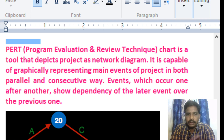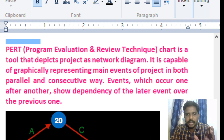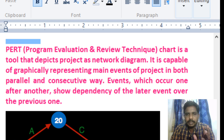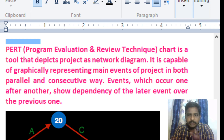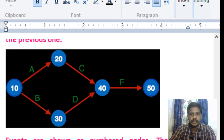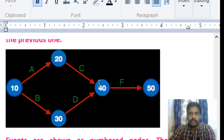In the PERT network diagram, we can represent five tasks. The first task is the base task. The second task is prepared after the first task. The fourth task is prepared after the third task. The third and fourth tasks are both prerequisites for the fifth task, showing the flow of task dependencies.